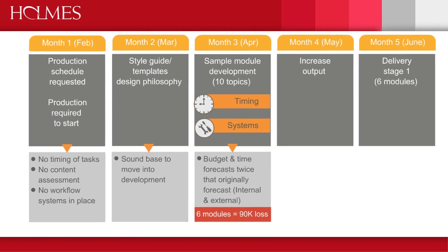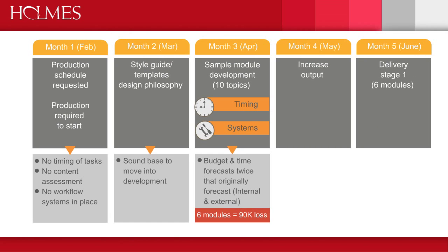In order to address the issue, we need to have a look at why this has happened. In our experience with startup projects, we've always produced sample content, timed the tasks, and developed systems prior to having to provide a production schedule. This is a typical startup procedure for new projects requiring media development. The extremely tight deadlines placed on this project have meant that normal startup procedures have not been followed, and this has led to critical issues developing.